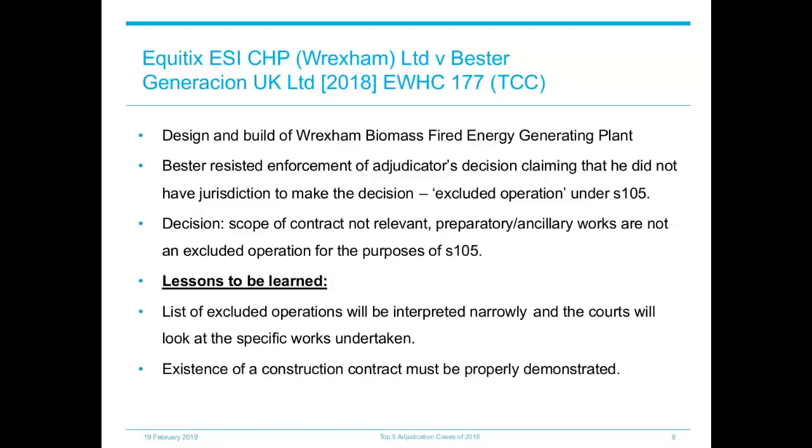Section 105 excludes the assembly, installation or demolition of plant and machinery on a site where the primary activity is power generation. Therefore, Beumer argued, payments made under the contract involved payments for excluded activities, i.e. they were not construction operations, and so the adjudicator did not have jurisdiction. The TCC rejected this argument.